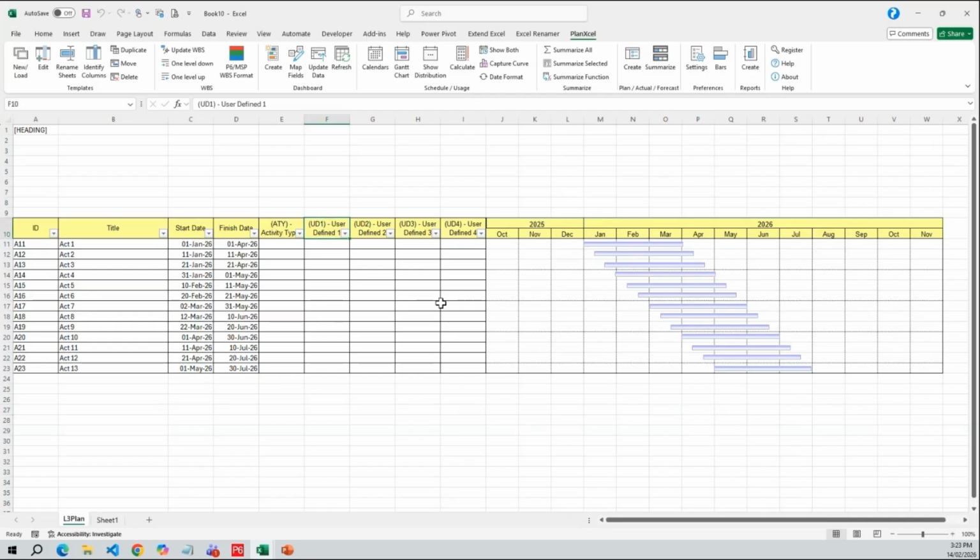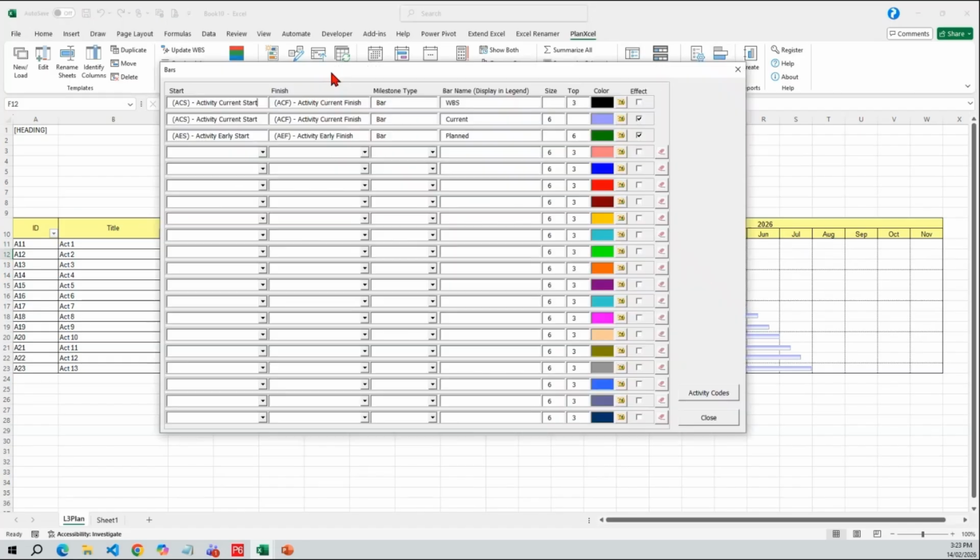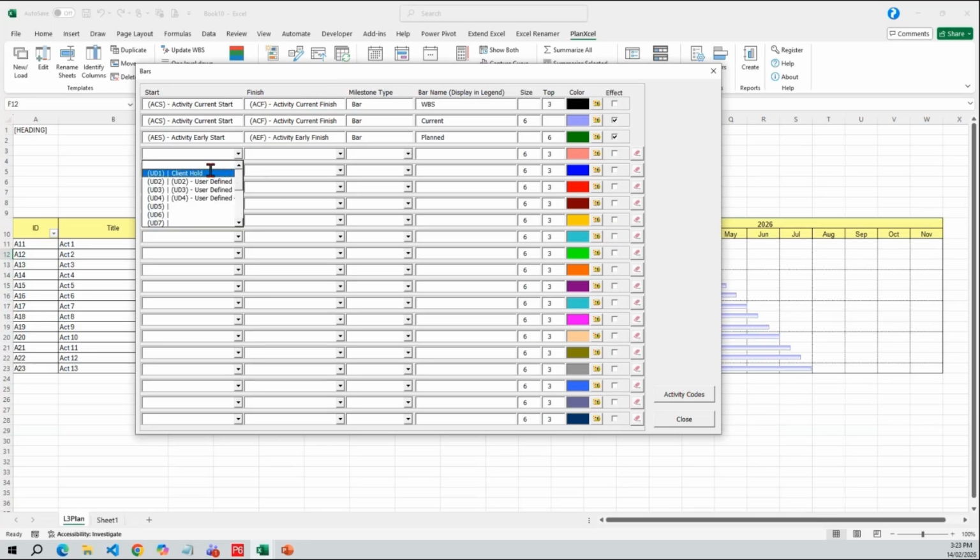something has happened. For example, a client hold has happened. And we need to show that on a particular date, saying that something has happened on 15th of January, right? Then we can show this in the bar chart by going to bars and then customizing the bars by selecting that client hold item. I want to show it as a triangle down, the color red, and the size.